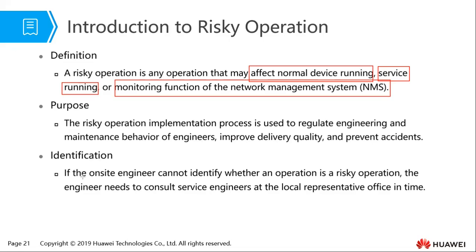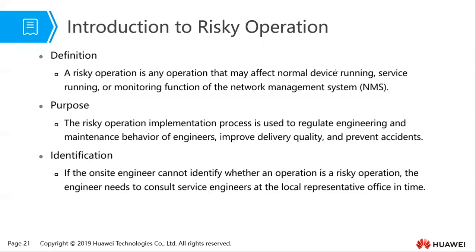Now, if the on-site engineer cannot identify whether an operation is a risky operation, the engineer needs to consult the service engineers at the local representative office in time. So if you're not sure whether whatever you want to do is a risky operation, please consult Huawei, for example, at the local office, so that they can advise you further.